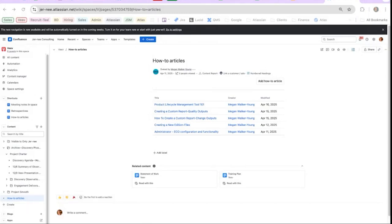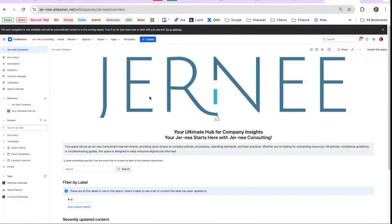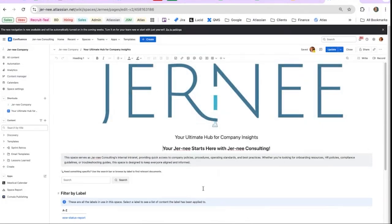Okay. So this is the business requirements, and then you can build a workflow to go to the appropriate business folks so that they can review and hit an approve button or trigger discussions from there. So we go back and forth until finally there is an agreement on, yes, this is 100% what the business requirements are. Then we can build our scope off of that.